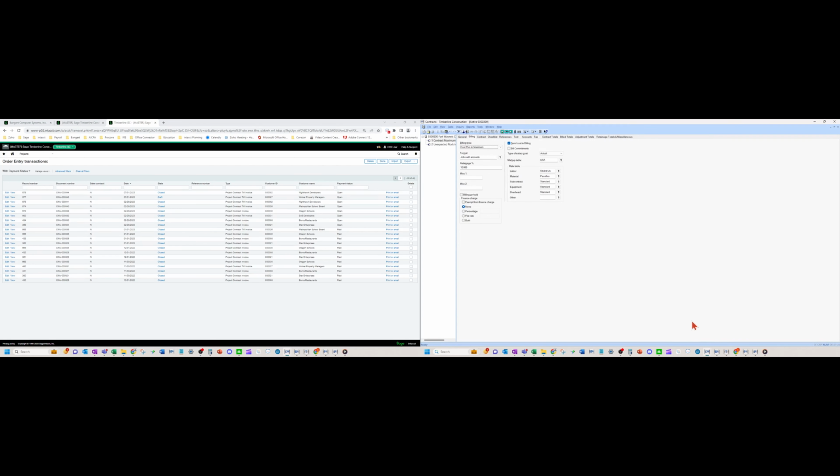Okay, so I'm going to navigate over here to the Contracts module. And here is a contract set up with the cost plus to maximum. Okay, so they have one line item because they accumulate, again, in Sage 300, the time and material to one line, but you can break it out on the invoice into these categories, for example. Okay, and you can do different things, again, with Sage 300 that way. You can put your totals in here for your contract max amounts.